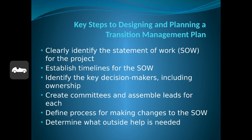Before any implementation of a transition plan can begin, a responsibility matrix needs to be created for all trades involved to make certain items are not being duplicated or forgot altogether. This is one of the very few chances for the leadership team to correct any deficiencies before each trade starts working on their action plans. Within this responsibility matrix, timelines are established for each trade and regularly scheduled meetings start occurring for each trade, as well as the overall leadership update meetings.